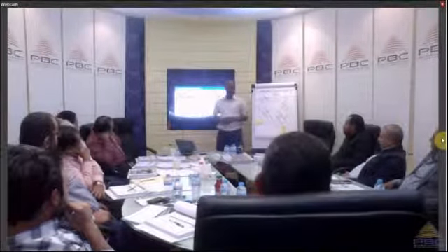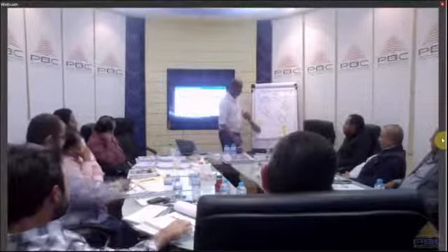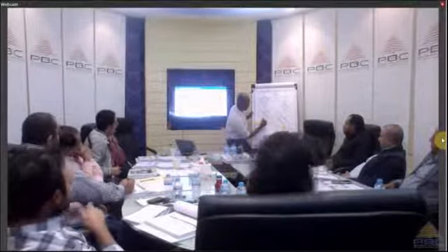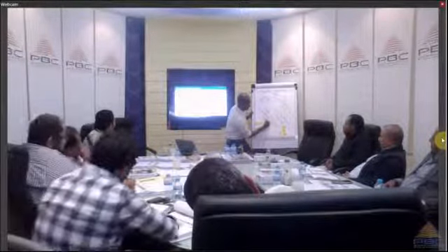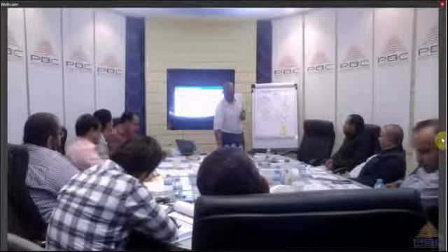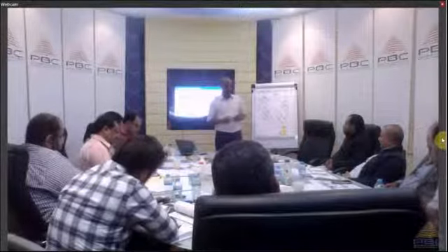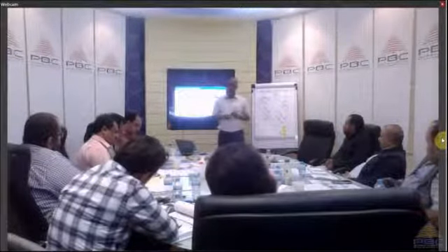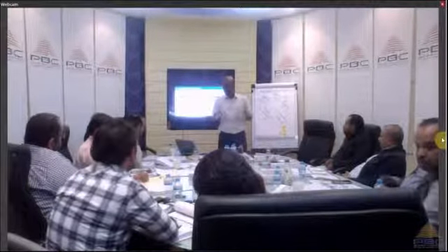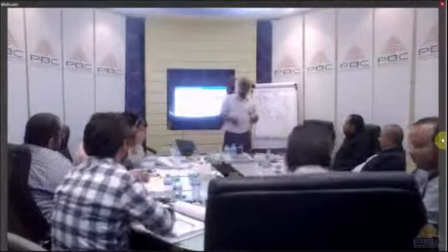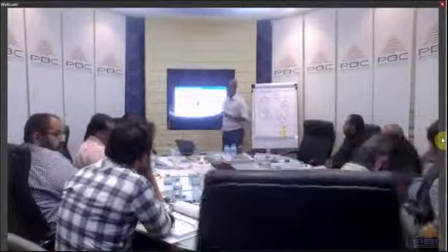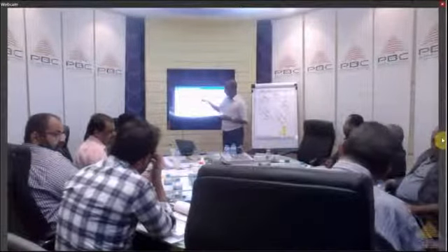The simplest one we call analogous estimating. This is a Greek term. It comes from analogy. Analogy means something similar. So to paint this room or to build this tower takes about 8 months, for example. Why? Because a similar tower built last year took 8 months. We call this the analogous estimating technique. We're talking about duration here.